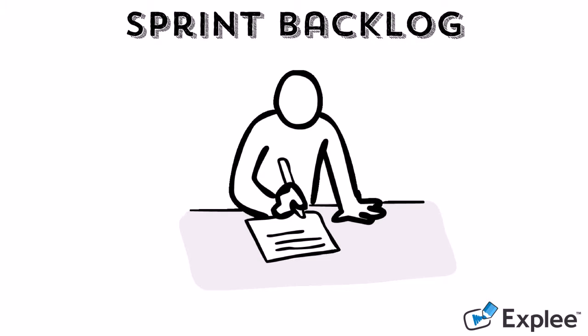Sprint backlog, which can go from 2 to 4 weeks of work per package. This decomposition is done in a sprint planning meeting that can last up to 8 hours, where it is defined what and how the work will be prepared.